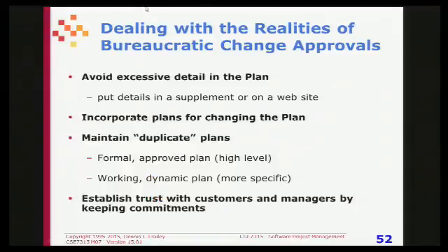Avoid excessive detail in your plan. Put details in supplements, in websites that you link to. I already mentioned putting a plan for changing the plan, and there's always the duplicate plan concept where you have a formal plan that doesn't ever change or doesn't change much, and then a working plan that gets into more detail that's changing all the time. The more customers and managers trust you, the less likely they are to want to approve every little change you make in your plan.